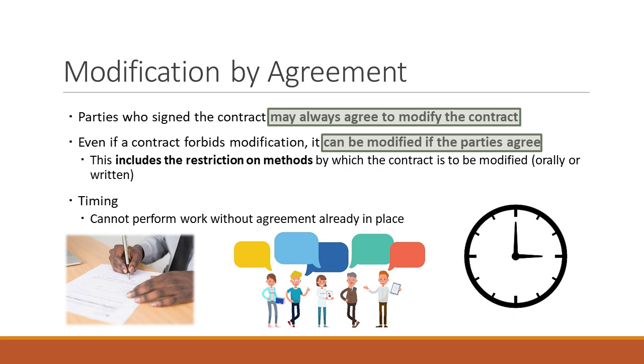Well, if you look at paragraph 8.2, it says, any oral modification must be put in writing as soon as practically possible. Because sometimes you're in the field, walking the project site, and there's an emergency because they're pouring concrete, and you need to make sure the rebar's set properly, and you have to make a modification right there. You say, no, you have to do it this way. It's being done wrong. Well, there's a modification to maybe what's in the drawings. It has to be done orally. Maybe it costs more money, as long as you write it up later. So there are all different ways, but the timing there is key.